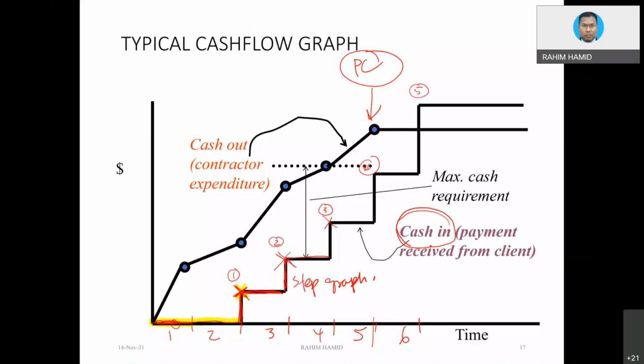the graph a little bit further down, and you notice that from this one to this one, it is basically a few months more. This is what we call the defect liability period. You see, as one of you asked me, if for instance the defect liability period is 6 months, it means to say your final account is only going to be completed here.